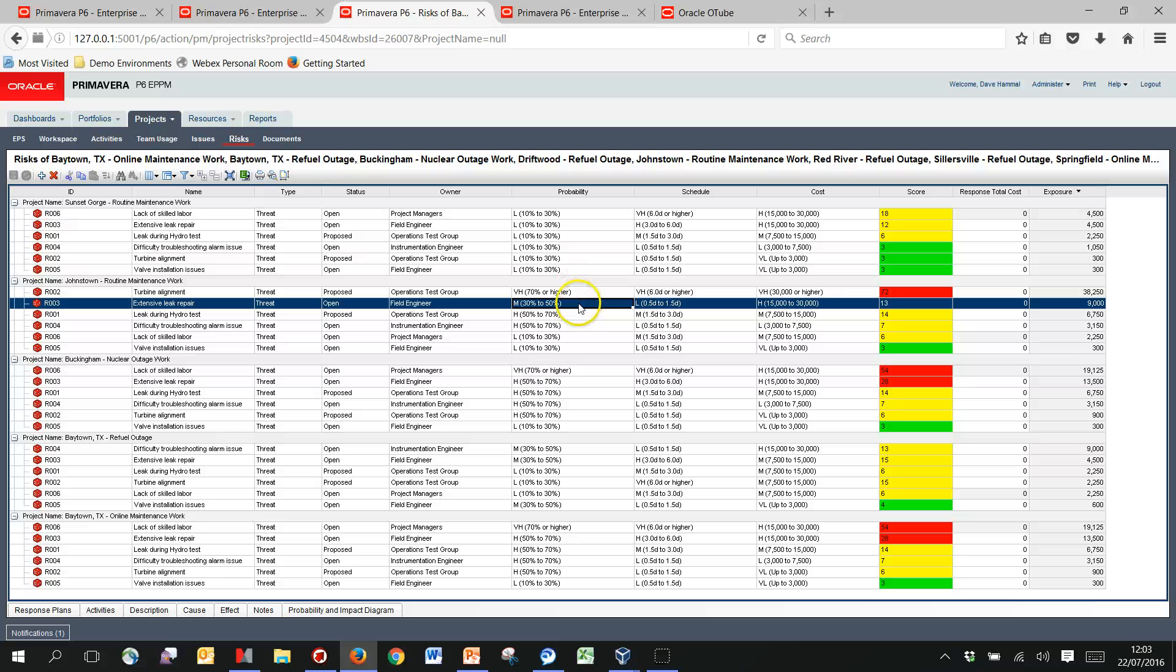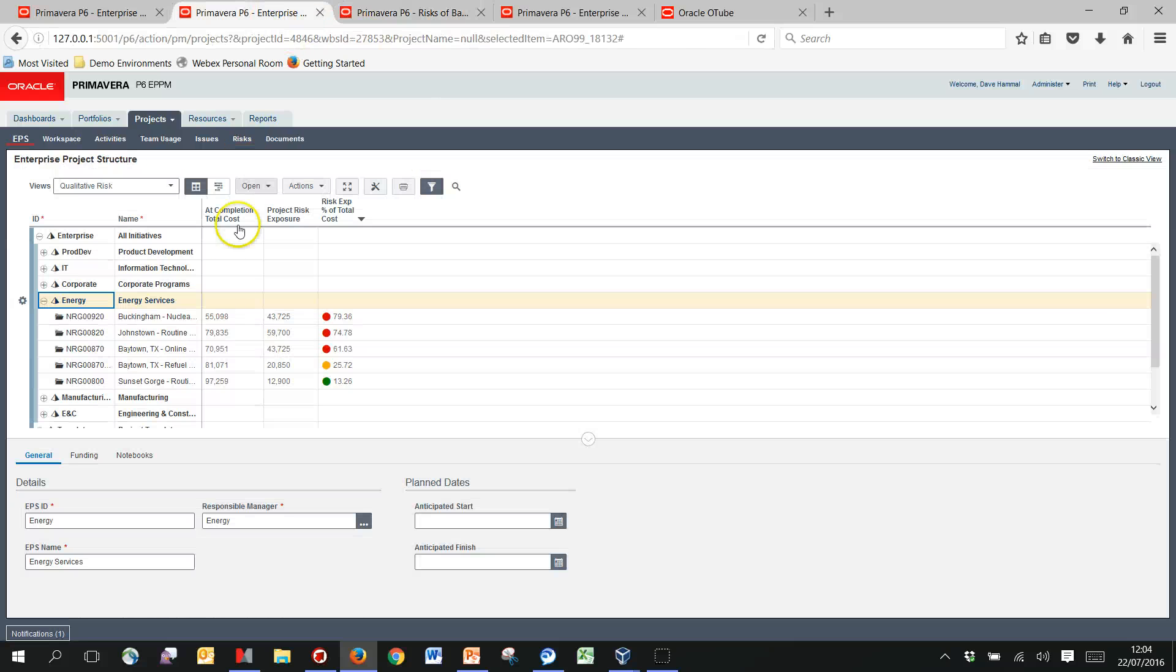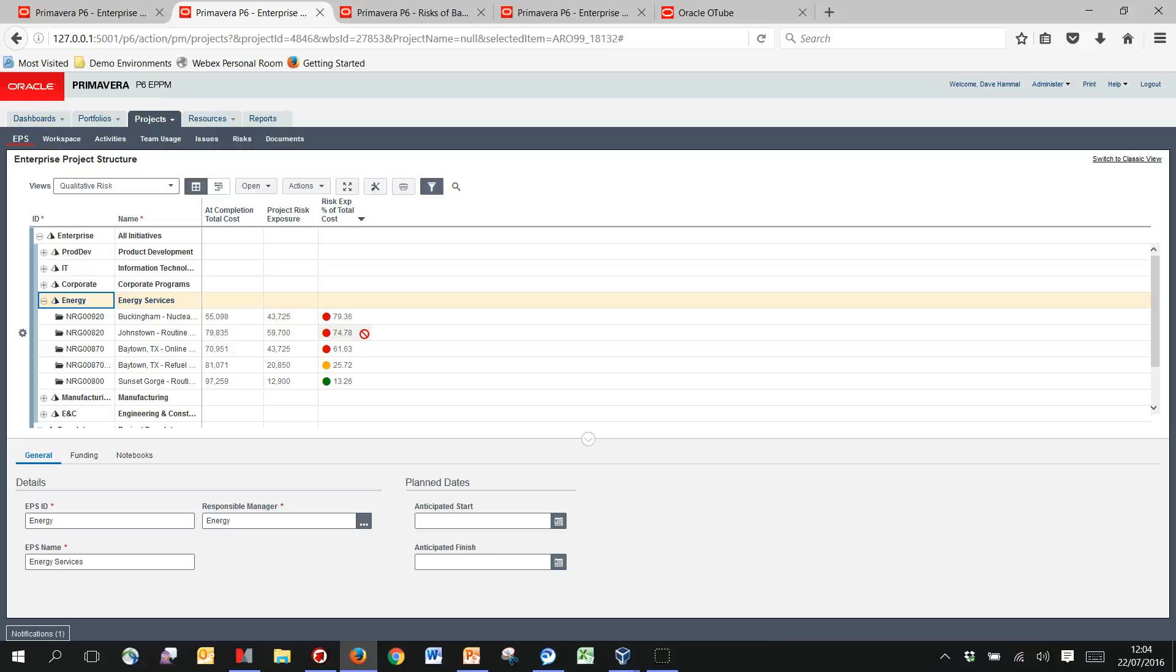40% of 22 and a half is what gives us the 9,000. Sum up all of the risk exposures within a project is where we then arrive at these values here. Then all I've added in here so far is a percentage: what does my project risk exposure look like as a percentage of my total project cost? I've got coloring on here as well just to flag whether that is getting particularly high or not. So I can certainly see for three of the projects it is looking very high.